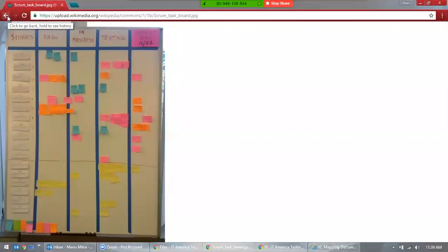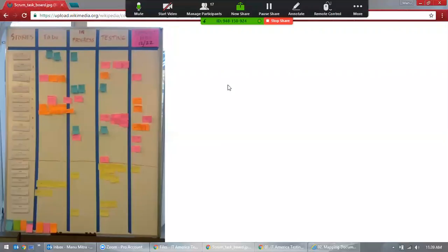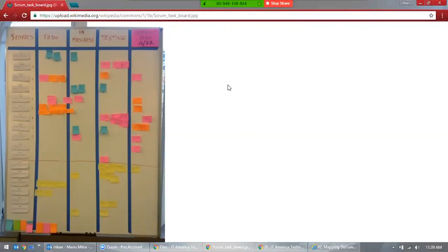Okay, so normally, all these are decided in the sprint planning. In the sprint planning, they'll say, okay, we have these user stories, and how much time will it take? Let's say they are discussing a user story, and they ask how much time it will take. The developer says, okay, fine, 3 days for development and 2 days for testing. Then they'll say, no, we don't have that much time. We can't take that much.